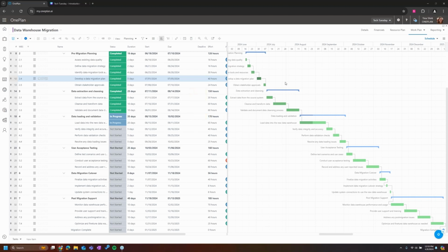When you create these dependencies, it's like loose connections between all of the tasks in your schedule. And when you update information, maybe the date of a predecessor task, it's going to push the dates for your successor tasks back, but there's not going to be a hard wall that you're going to run into. But when you enter constraints into the mix, you're going to start running into those hard walls, and you're going to start to potentially run into issues with your schedule. So it's important to understand constraints and how they can enter into your schedule and what they mean.